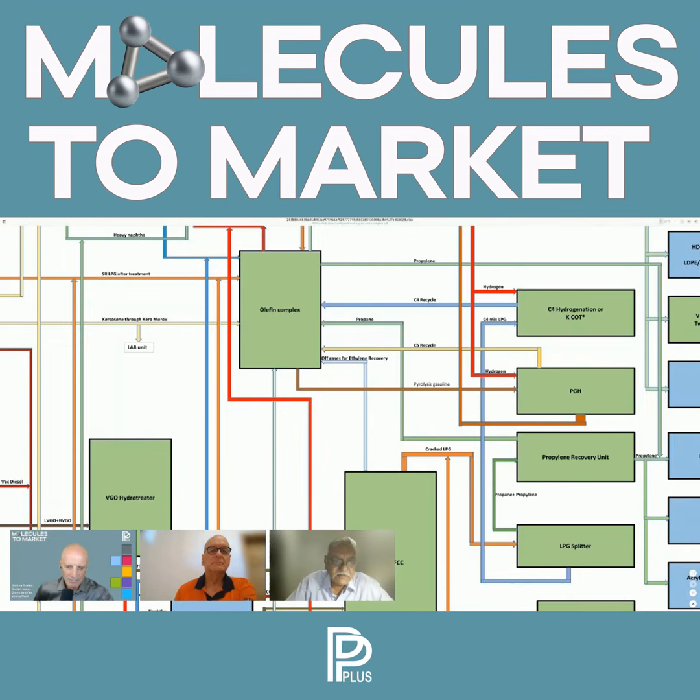And while engineering may be 24 to 28 months, so there is a lot of overlap. Engineering is happening, and I am also starting construction in parallel. Of course, there is a sequence of what I will do first, what I will do later. But what I meant to say was we do concurrent work. We do not wait for engineering to achieve a certain degree of maturity before we start construction. This way, we are able to compress our overall time cycle.